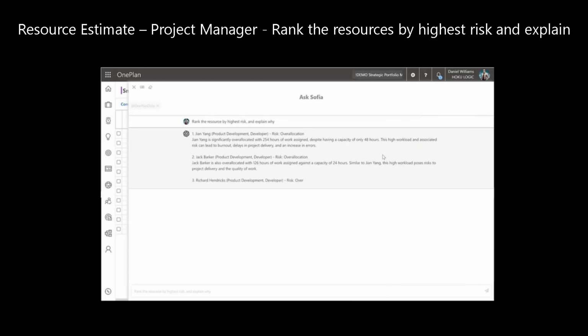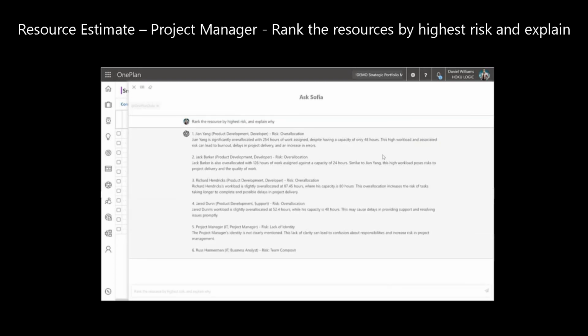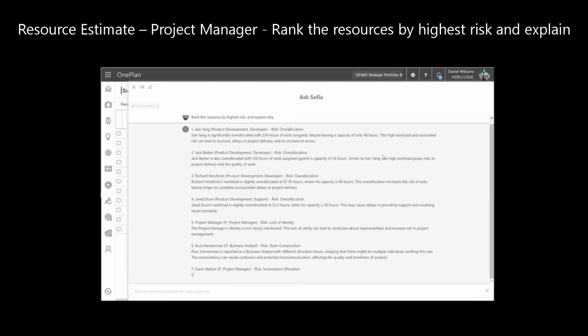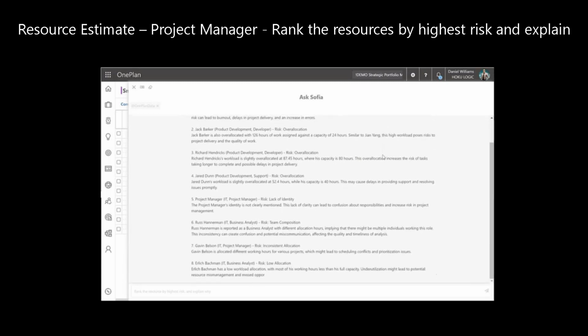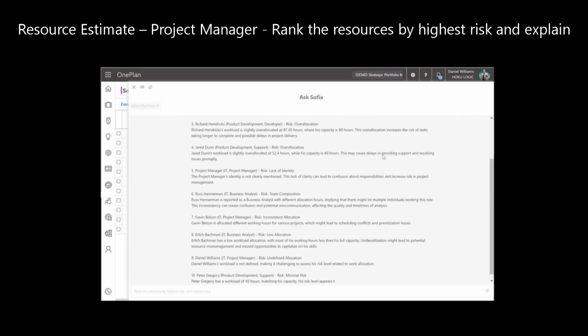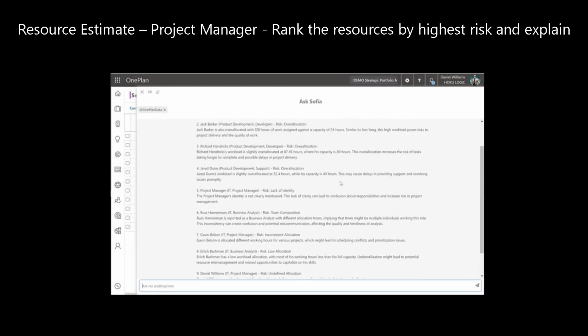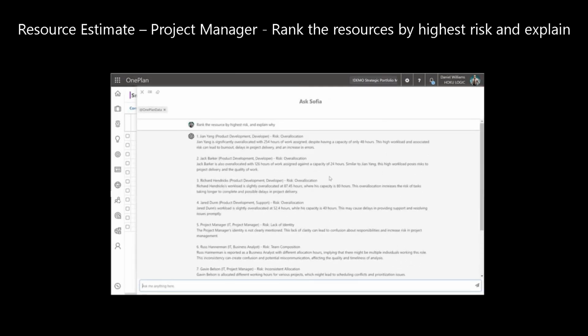And we're getting the specific named resources that are in my resource plan, showing, which we could see from the grid, the over allocations, and even where we have generic resources that we haven't actually addressed. It actually tells you, lack of attention. So the resource is either over allocated, that's been identified, or we actually haven't identified the named resource.